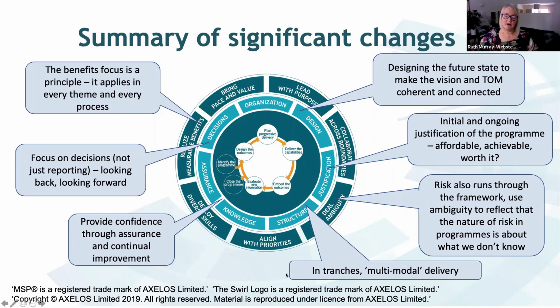So we've stuck with tranche, but there is a phrase, an Axelos phrase they used before MSP, the idea of multimodal delivery. What they mean by multimodal is that work within a program could be projects, or other work, such as process improvement that's not organised as a project, for example. It makes really clear how projects using an agile way of working can coexist very happily alongside projects using a linear life cycle, or other techniques, within the same program structure. Axelos call that multimodal delivery.